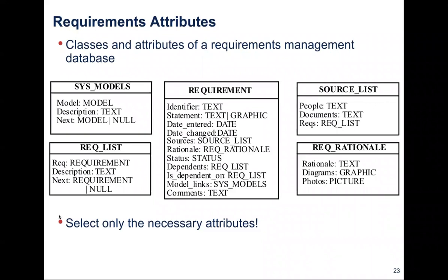This step is really efficient in monitoring attributes of each requirement. Regardless of the requirement document, I might use a database to store the requirements and even the attributes of each requirement by identifying different classes, and within each class, we identify the attributes. And this will help on providing unique identifiers for requirements, in addition to monitoring all the attributes that will be linked to the requirements. At the end, we will have a relational database where all the tables are related by different primary keys and foreign keys.